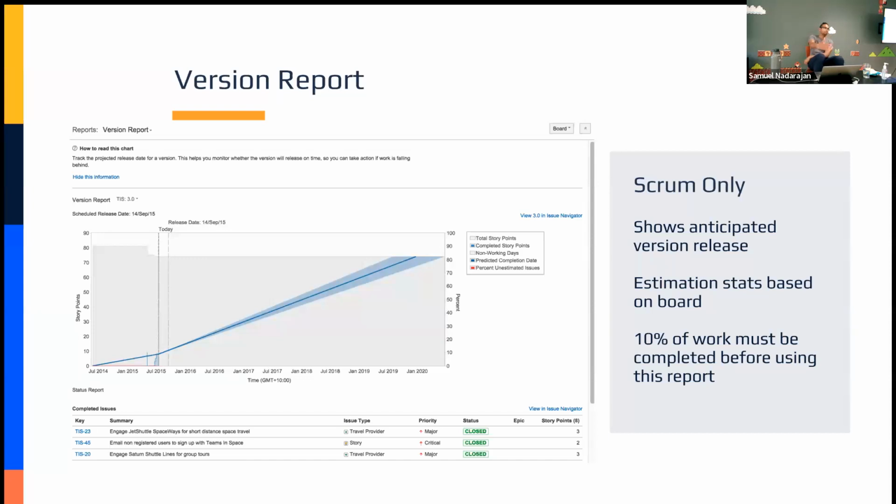When you create a version for your project, you can specify a start date and an end date, right? And of course, when we set up these versions, we have a time frame of when we want to get that complete. You can take those start and end dates, cross-reference them with the version report, and determine what's realistic versus not realistic as far as completing the work I've currently associated to this version.